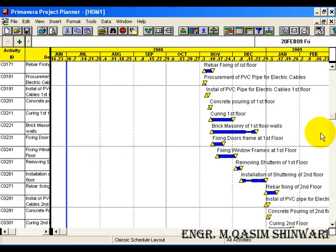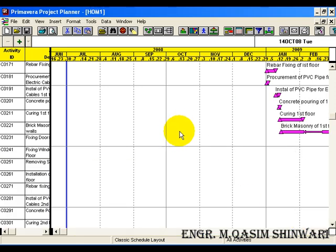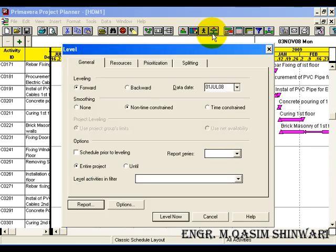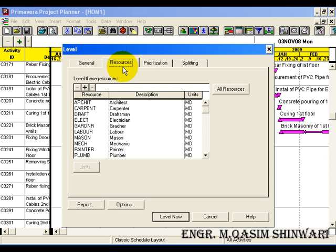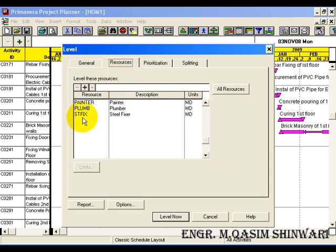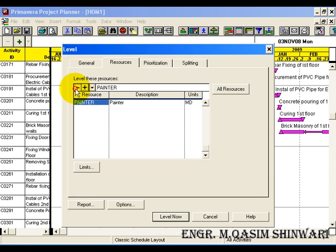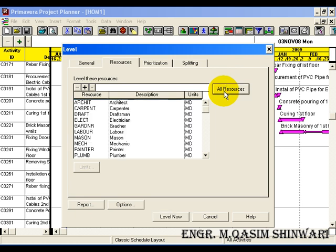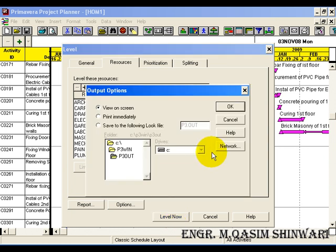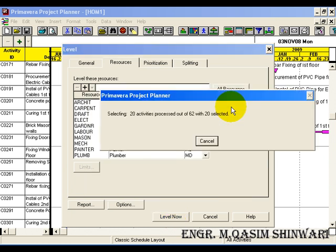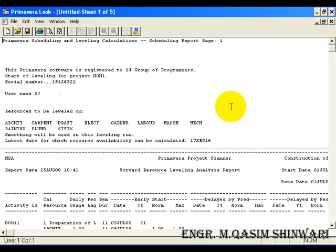Now coming to the leveling. Click on the level icon. Here you can see different tags. So go to the resources tag. Here if other resources are present, delete one by one. Click on all resources. And then click on level now. View on screen. This is the leveling page.